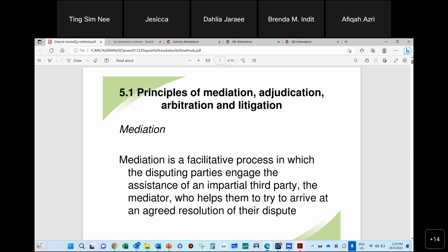Okay. So those clauses, if you don't believe me, you can flick through the PAM contract, you can flick through any of the contracts. If they do have dispute resolution clauses, first they will say that you all must resolve it among yourselves. Refer to the SO or the SO representative or the clients, to help resolve the dispute or the issues as amicably as possible, or to resolve it nicely, as soon as possible. So these will be the clauses that you see.